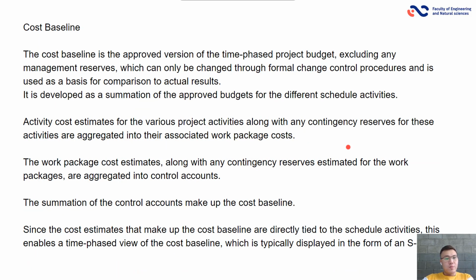Cost baseline. The cost baseline is an approved version of the time-phased project budget, excluding any management reserves, which can only be changed through formal change control procedures and is used as a basis for comparison of actual results.